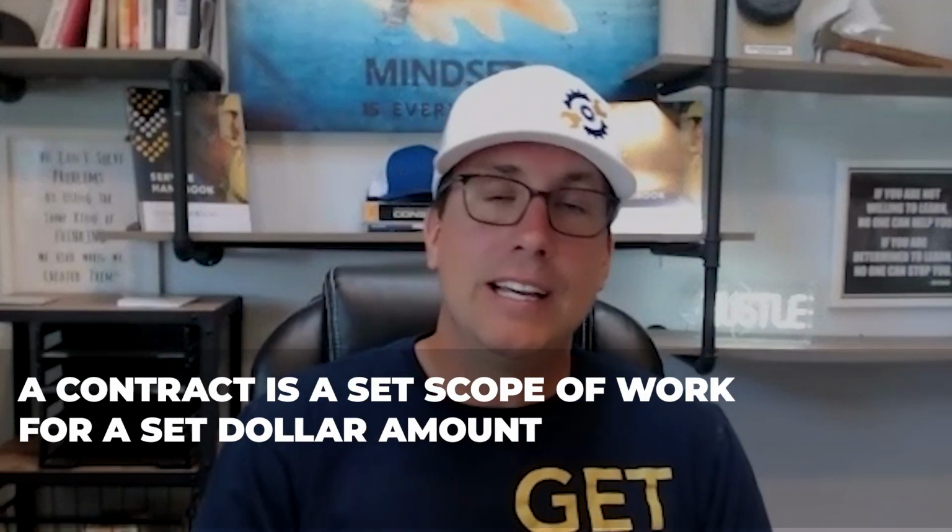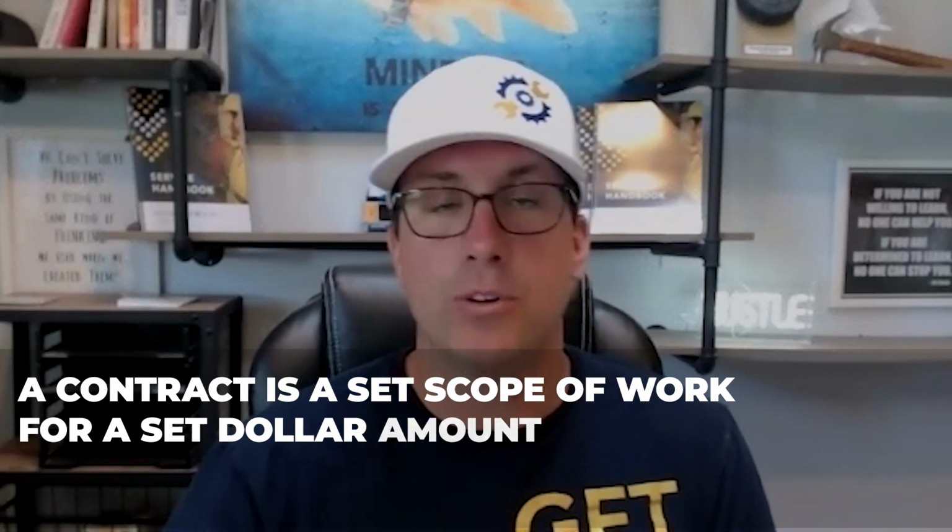So if you think having your guys show up to the job to see it for the first time ever and find out what's going on is a good game plan, I'm going to challenge you and say that's a really sucky game plan, because that's doing nothing but costing you money. A contract is a set scope of work for a set dollar amount, which means the faster you can get that scope of work done, the more money you can make. If you have 10 hours inside the job and you get the job done in 6, let's hope you don't cut any corners and you do exactly what needs to be done. But ultimately, that 4 hours goes directly into profit. That's how you increase it. That's the entire key to the operational excellence side: to be as efficient as possible.